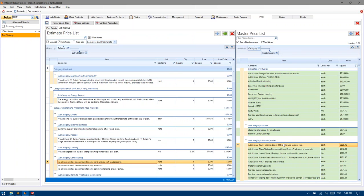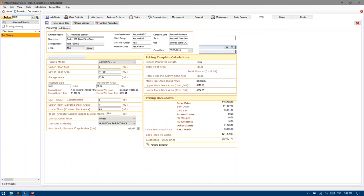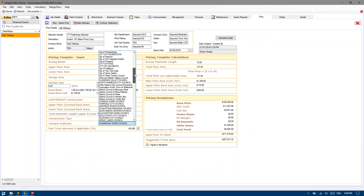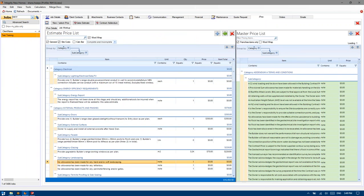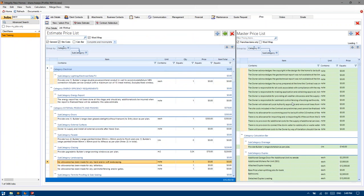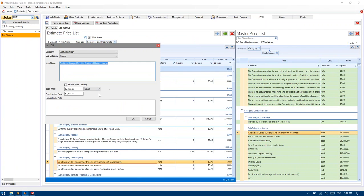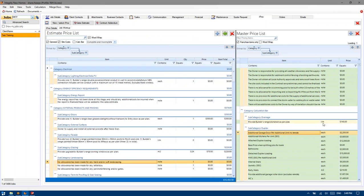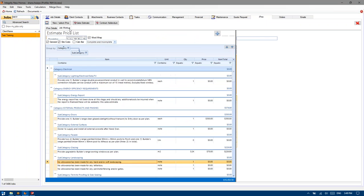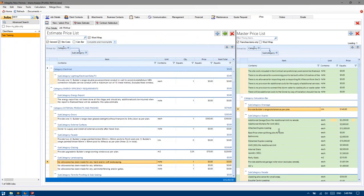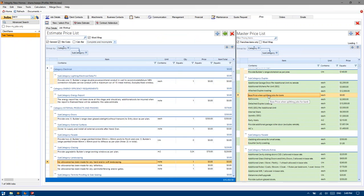That means effectively when you're in Adelaide, we're actually marking up the variation items there higher than the base price of 0.94, for example. The job workup items will show at exactly 1.0 loading of the price set in here. It's only where the loading is greater than 1 that it will apply a positive.